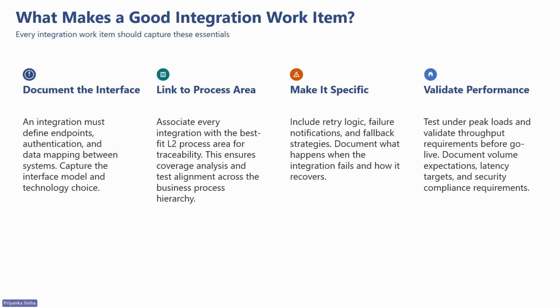Third one is make it specific. This is where teams often fall short. Include retry logic, what happens when the call fails. Document failure notification, who gets alerted. Define fallback strategies if the integration is down, what is the manual workaround.